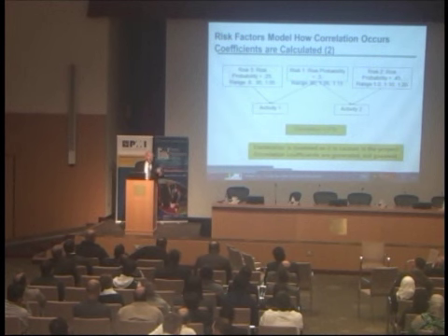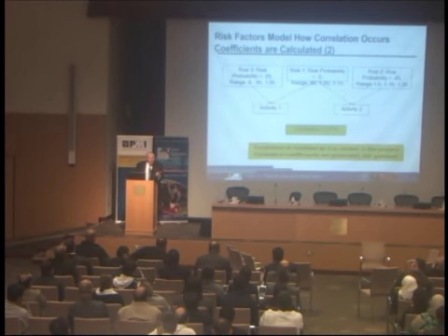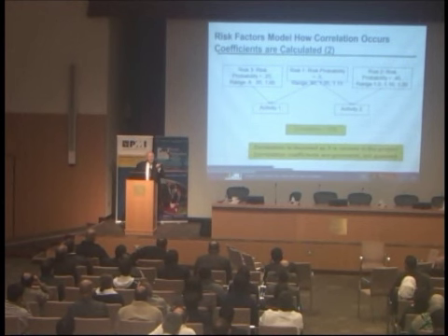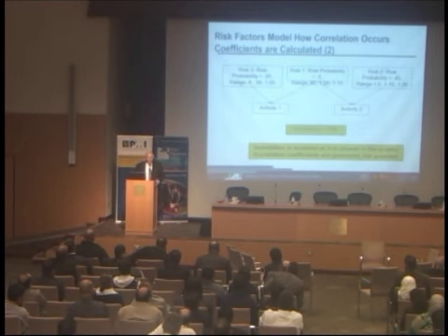Number one, I couldn't have gotten it. Number two, I don't care what the number is anymore because I know that the correlation coefficients are modeled how they occur in real life. They are internally consistent. It's been proven that they are internally consistent. You'll never get an inconsistent correlation matrix when you use this method of modeling to generate the correlation coefficients.